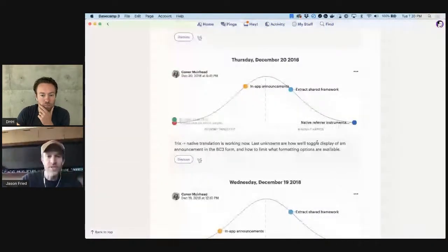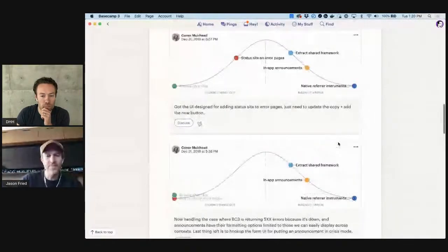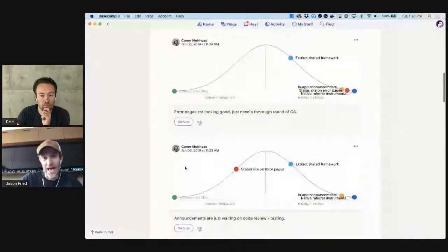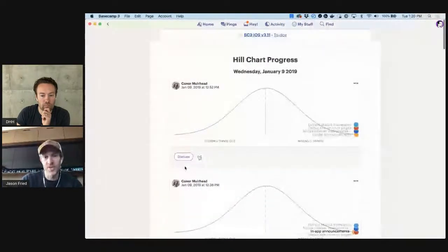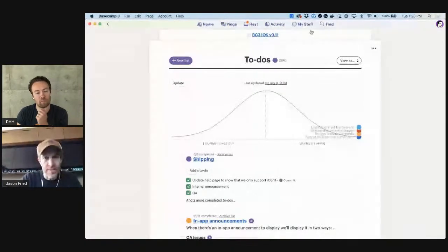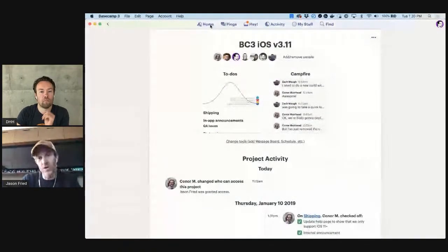But you can see how projects evolve and how projects move. And sometimes you're going to see new scopes show up that weren't there in the beginning, that are added as the project continues because new work is discovered along the way. So Ryan does a whole day-and-a-half workshop on this. I'm kind of speeding through it here because it's in some ways a little bit technical for this kind of demo. But the point is that this is how we at Basecamp get a sense of where projects stand at a given time. We use the hill charts for that. And most projects that are really on track are really well tracked on the hill.